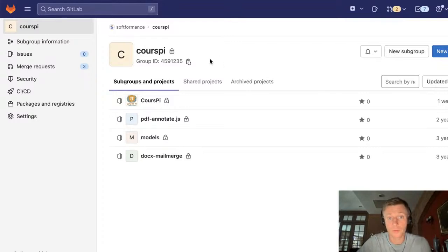But some old repositories are still in GitLab, and this is an example of a deeper, more complex technical oversight step where we asked our developer to go and do some coding, some scripting. We call it technical spikes. What does it mean? It means, please try that API or try to do the task, kind of a proof of concept, quick, just one. There's maybe 1-2 days for each of these.